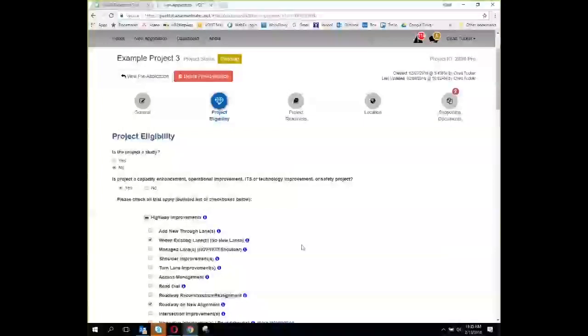Hey, Chad, you did mention earlier that the responsibility for pre-screening rests with both the district and central office. Yes, pre-screening, there will be a team with OIP that's going to assess the VTrans needs, and then the district and the central office, whether it's at DRPT or VDOT, will go in and assess the project readiness and project eligibility. And once that workflow is completed and a decision is made, we'll hit a submit button.